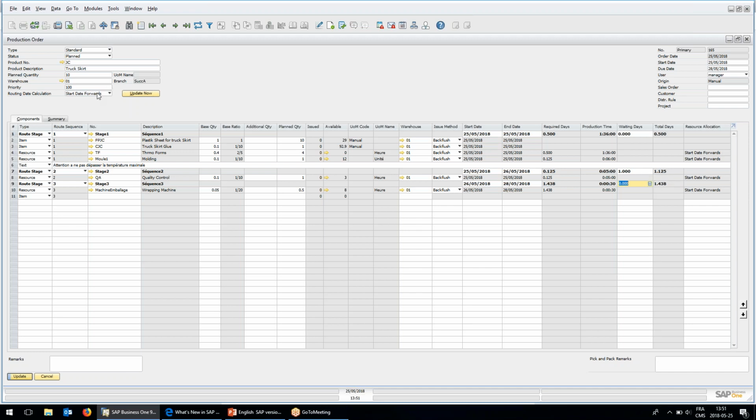And like we saw this morning, if you add more time to a step and it's interfering with the next step, something is going to pop up in red and show you that something is wrong, because an activity can't start before the other one finishes, right, Christophe? Yes, exactly.